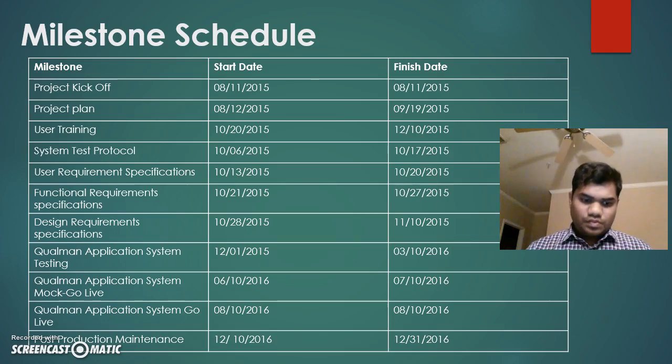And then the system will be tested from December 2015 to the middle of March 2016, so that everything is well and fine with the system, and during that time the validation will also be carried out, and then the go-live date is on August 10th, 2016 for this system.